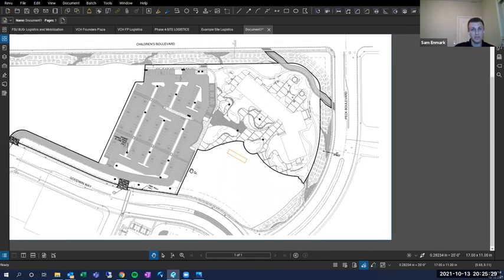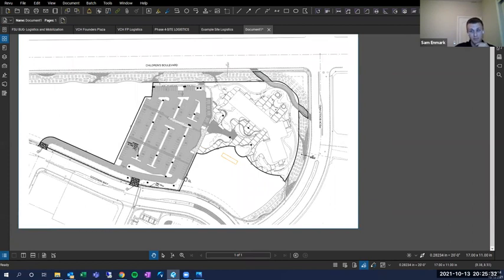And then my next one that I'm going to do is draw in my fence line for this. And you can use a markup because I think the site logistics plan is a visual tool. The markup tools will work just fine here to show that. But just to add another layer to it, what I would actually do is use an actual dimensioned tool. So the poly length, it's going to give the same properties as your normal line, but it's also going to measure the length of the fence that you're drawing, right? So when your project manager comes up to you and says, hey, how many lineal feet of fence do we have? You can click on it and say, oh, boom, we got that much.